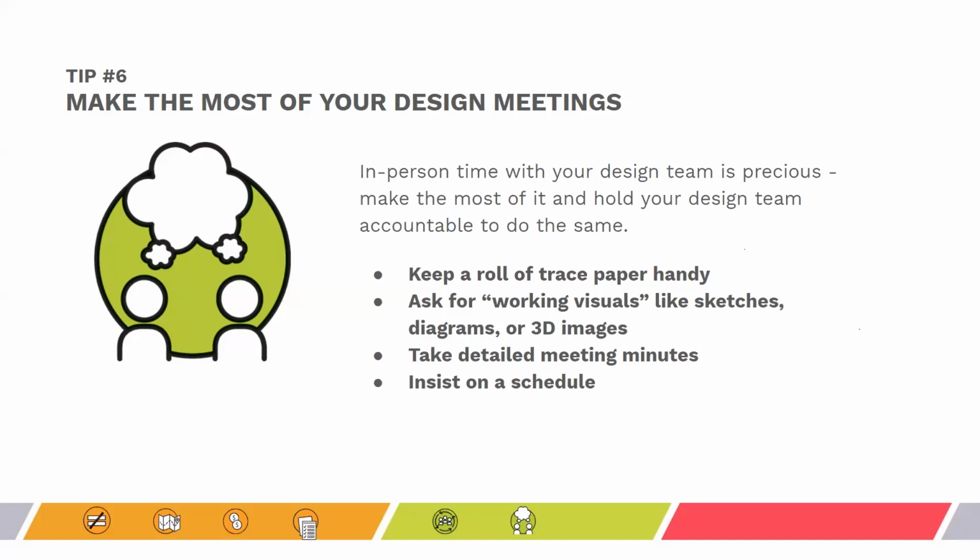Taking detailed notes on what's being discussed is also really key, and have your architect create meeting minutes from these notes and their notes. Taking meeting minutes and sending them out to the whole team clarifies the discussion. It also gets everyone on the same page and serves as a really useful record later on, months or years down the road when memories become hazy. And pro tip, for bigger projects, it's important to set a deadline that everyone has to review and approve the minutes by. So you can be absolutely sure that everyone reads them and agrees on what is recorded.